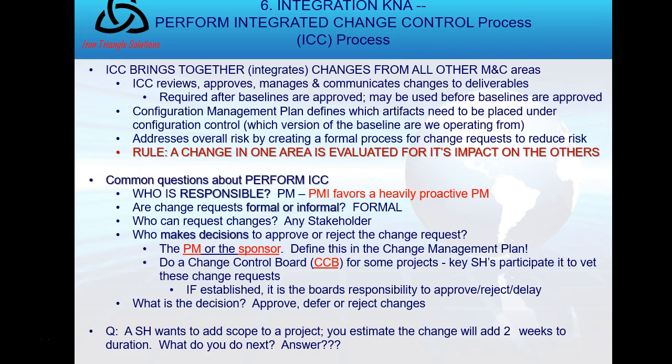And one of the key rules that I want to emphasize is that a change in one area, I mean the management plans, the scope plan, the cost plan, the risk plan, is always evaluated for its impact on all other management plans. A change in one management plan is evaluated for its impact on the other management plans. Very important point.